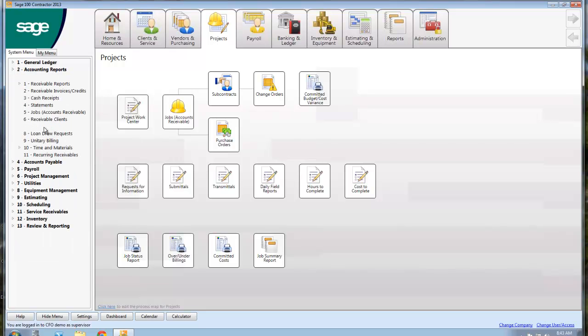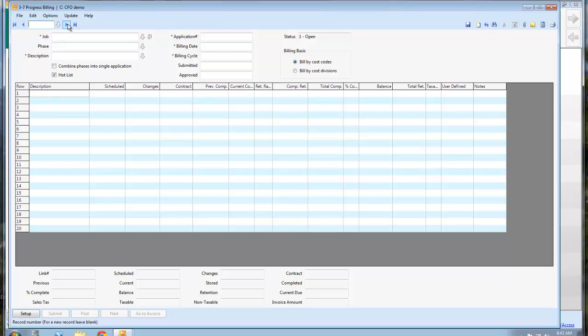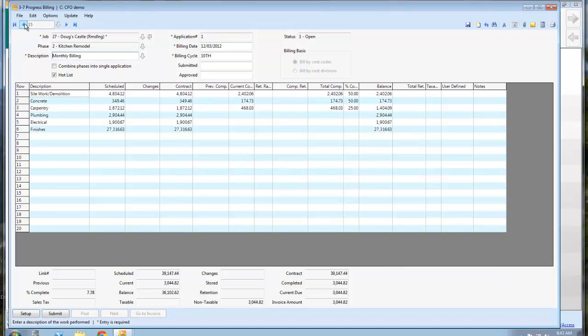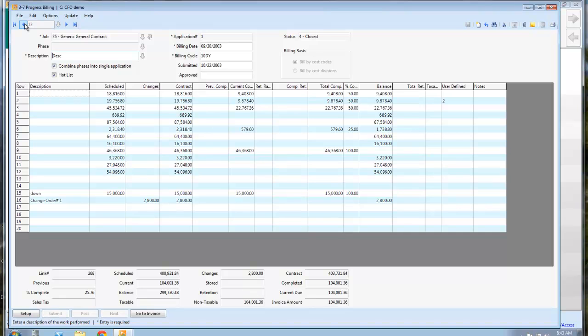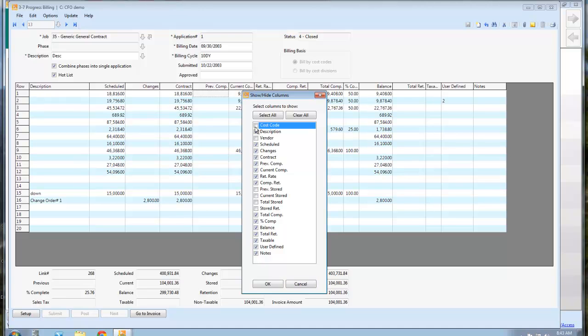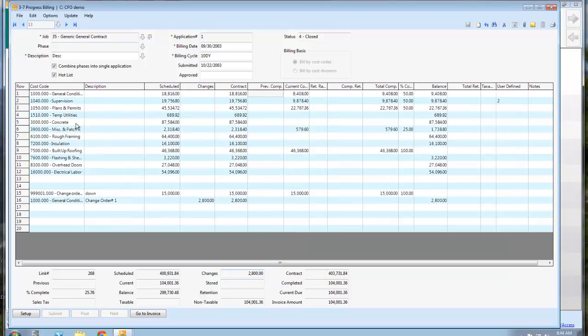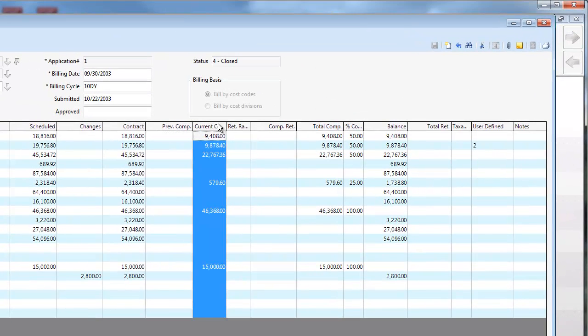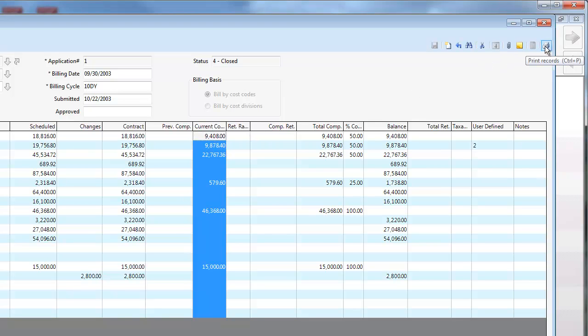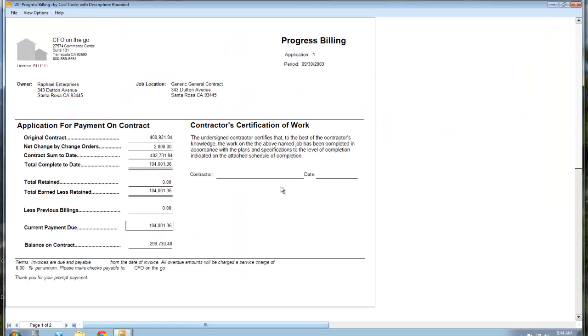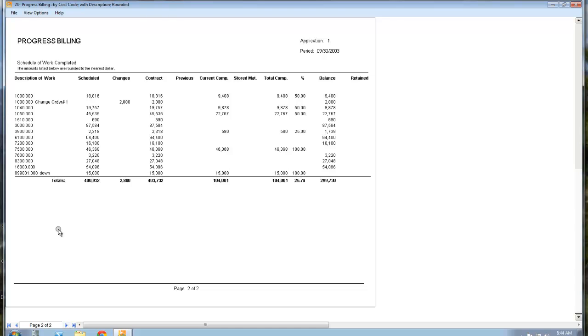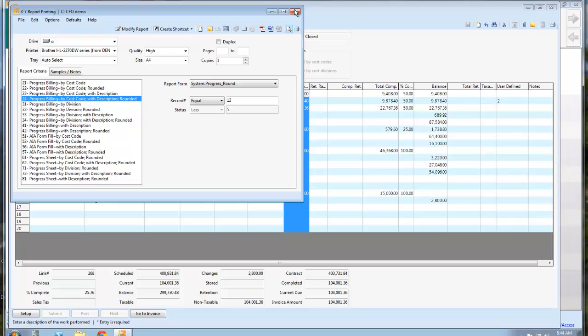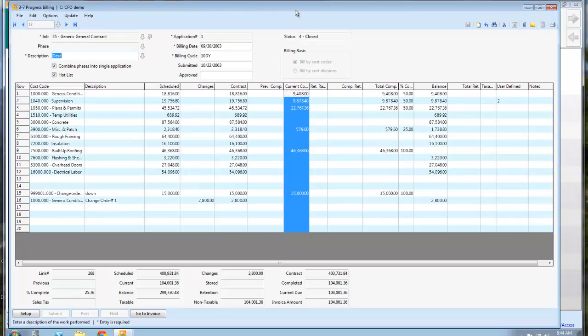Accounts receivable. We do do full progress billing. AIA 702-703. I'll go find one real quick here. So here's that same job. These are my schedule values. If I had change orders, they'd impact individual lines being here. This is what I'm billing currently. And somebody asked me yesterday, and yes, if you had materials stored on the job, like if you had rebar stored on the job, you could actually put materials in there. I just would have to add those columns back in. This should look pretty familiar. Very similar to that 702-703. And then the detail behind it. That's that. So yeah, we do do that.